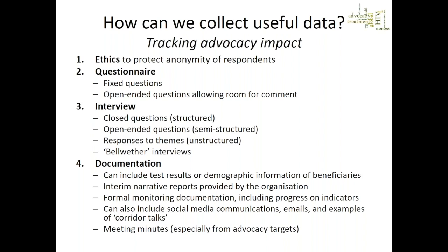Secondly, you can use questionnaires, fixed questions or open-ended questions. Thirdly, you can use interviews. I've done a lot of interviews for project evaluations, but it should be everybody, obviously, so it should be beneficiaries, project managers, stakeholders, and also I put in bellwether interviews. Now, these are interesting interviews which aren't always done because they can be tricky to set up, but that's when you ask somebody completely unrelated to the specific project, but maybe in the field. So it has nothing to do with the organisation, nothing to do specifically with the topic, but maybe more broadly involved in health.